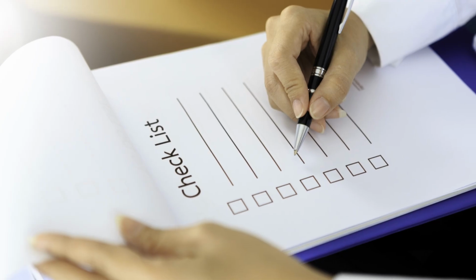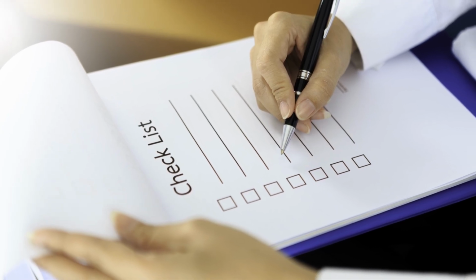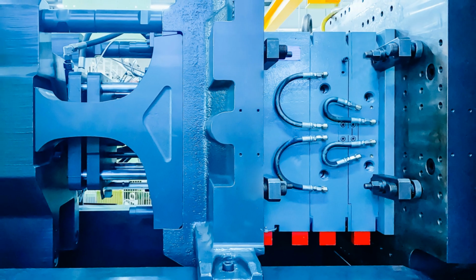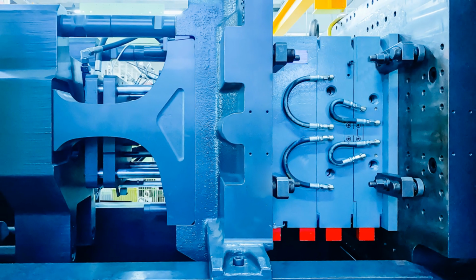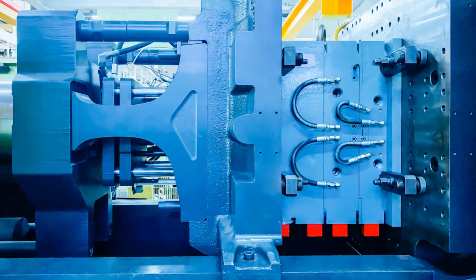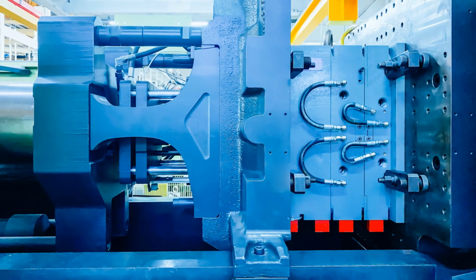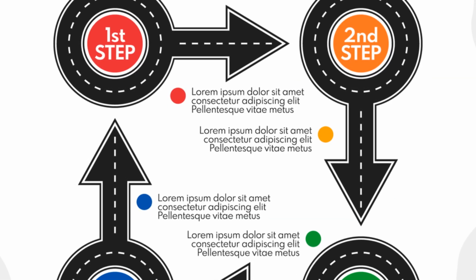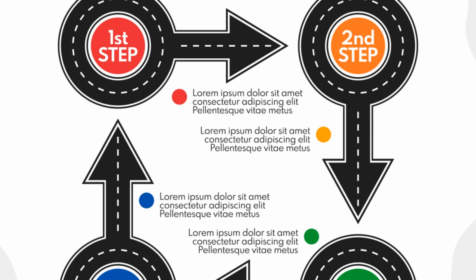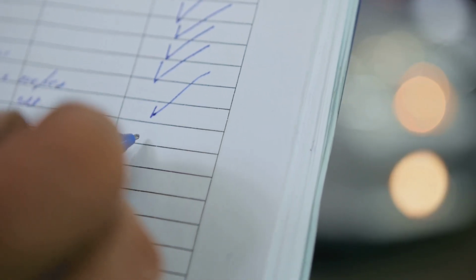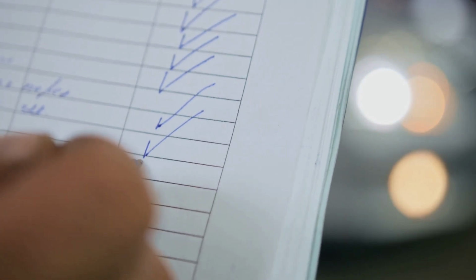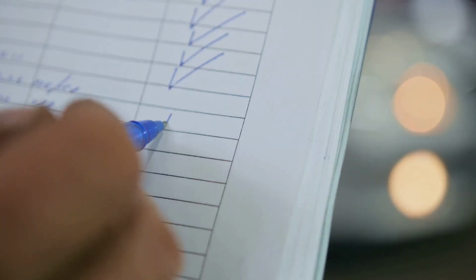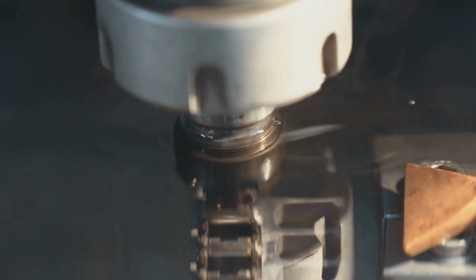Section 6. Conclusion. Your checklist for success. Bringing an injection mold from concept to reality across continents is a complex undertaking, but it is not an insurmountable one. The key to success is not the absolute cheapest supplier, it's a rigorous, systematic process. Break the journey into 6 manageable steps: definition, verification, quotation analysis, design control, production management, final delivery. Do not proceed until the previous item is complete.